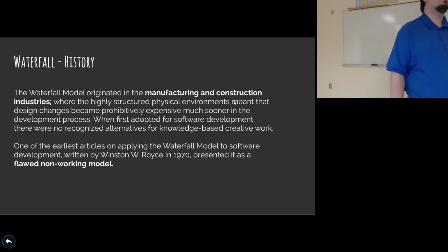It's usually pretty easy to change things in the middle of the way. But if I figure out the foundation's wrong late in the process, that's a problem, right? If I have to change something about the foundation, I have to demolish the house and start over. So that's where this comes from.